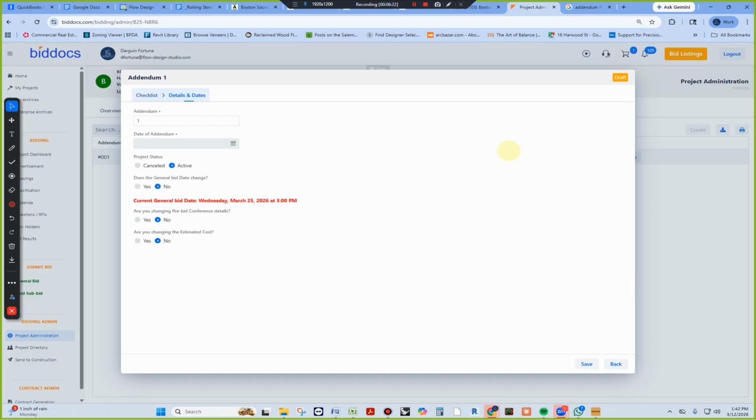The dates are important. I've always exercised that very clearly when we're training our staff members. Your drawings have to have the current date, always have the correct date, because there are multiple versions of drawings. What I have realized is that contractors, owners, and some people always refer to an older reference and waste a lot of time and create a lot of frustration by the sheer fact that they're not looking at the most up-to-date change.